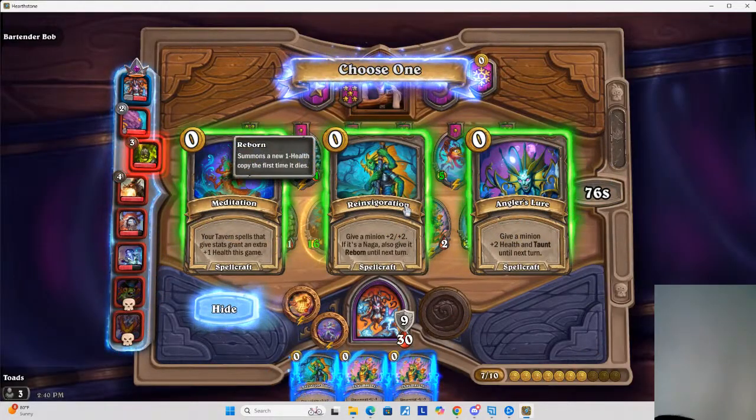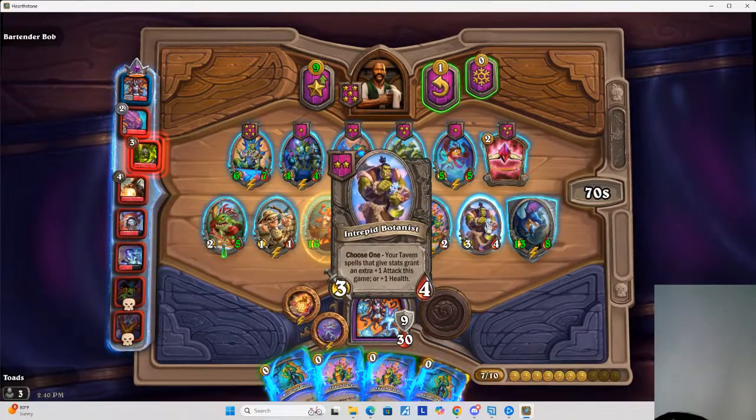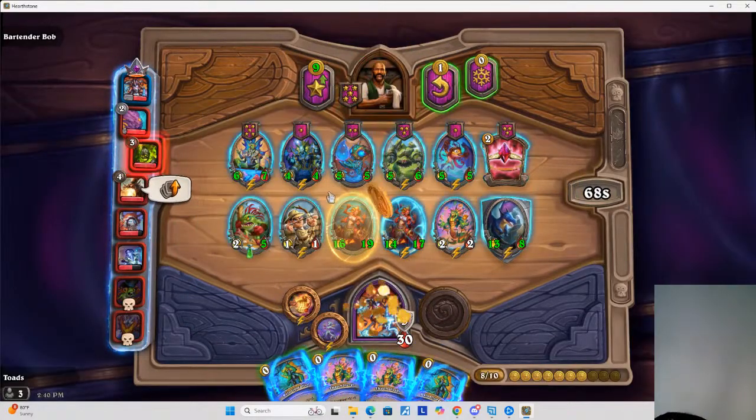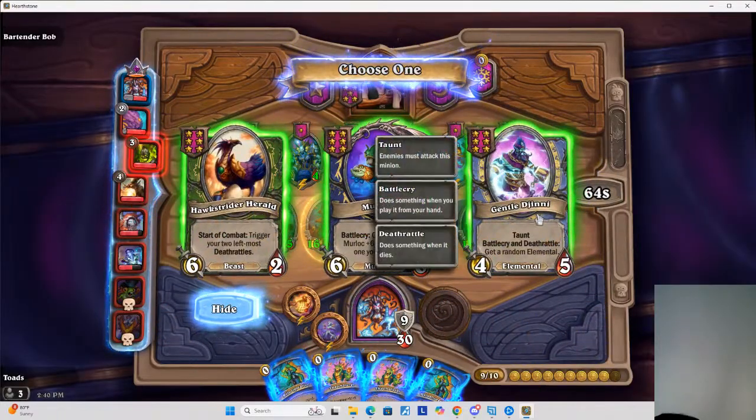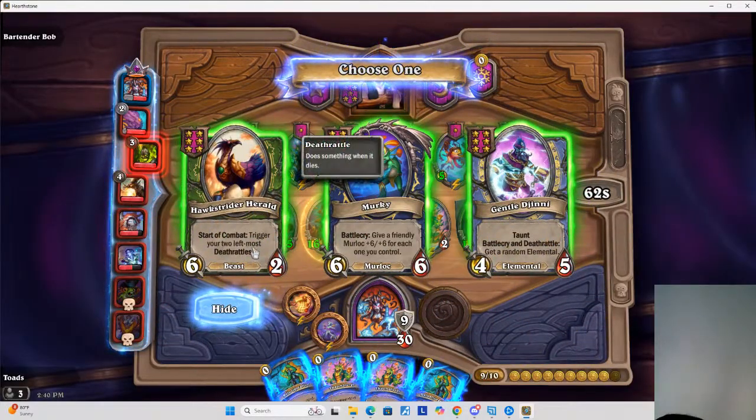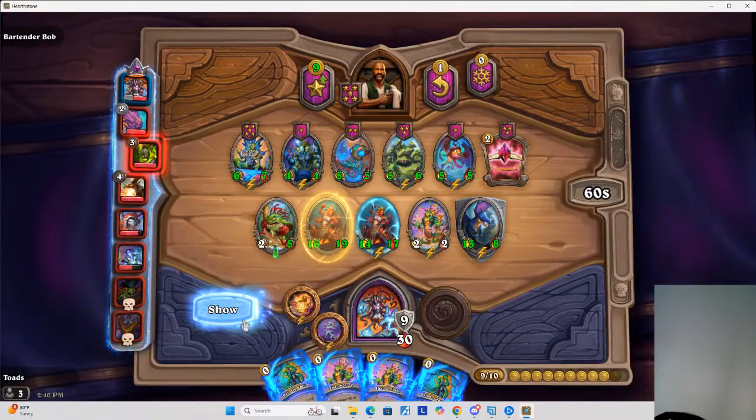You've probably had conversations where someone said, "Oh, I thought you meant." Don't assume that the customer sees the definition in the same way you do. For each element in the project definition, paraphrase what's written. Describing something using different words could uncover inaccurate information.